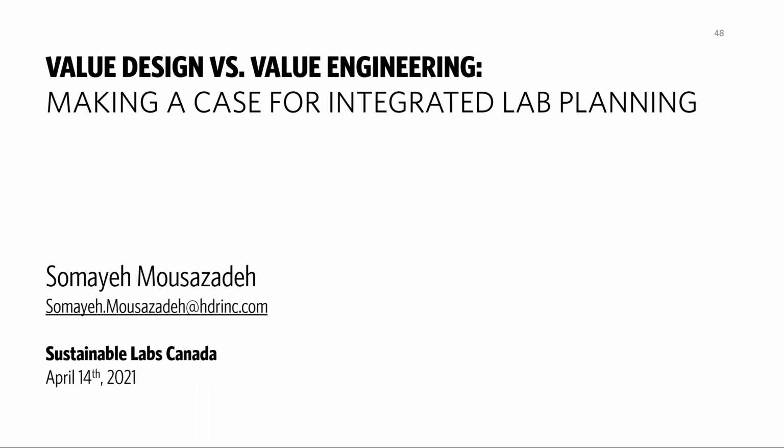So for the IPD process, what happens is that at the beginning of the project, the team, which typically includes the architects, the main consultants, and the contractor, selects major trades for the project and brings them officially on board from the get-go. So the trades are at the table when the design is evolving and some of the decisions are made.